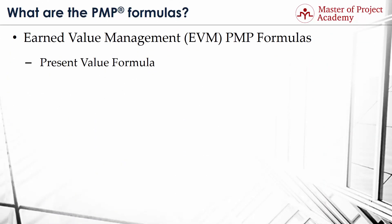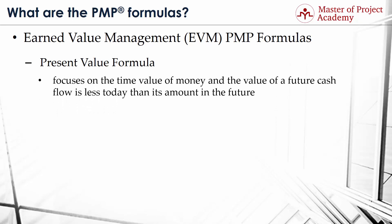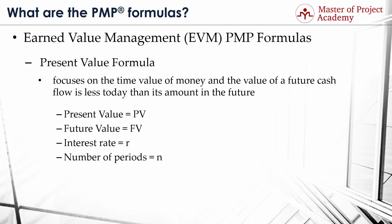PMP formula number 12: Present Value Formula. One of the PMP formulas which focuses on the time value of money — the value of a future cash flow is less today than its amount in the future. It is used in the project selection process. To understand the formula, you need to know: Present Value = PV, Future Value = FV, Interest Rate = R, and Number of Periods = N. Thus, the formula is: PV equals FV divided by the result of (1 plus R) to the power of N.